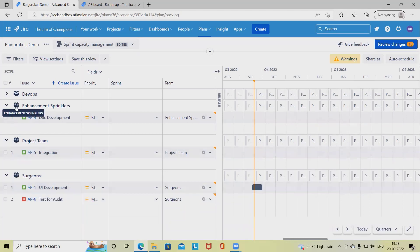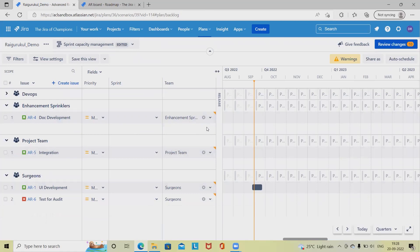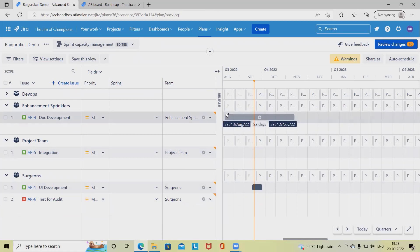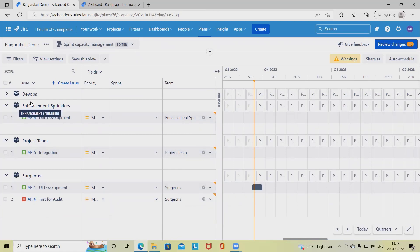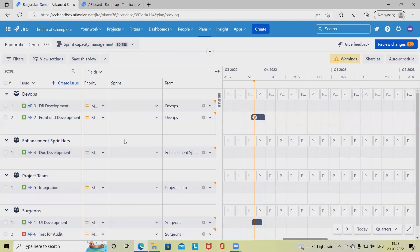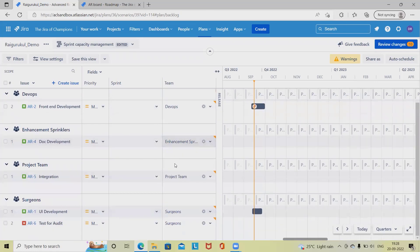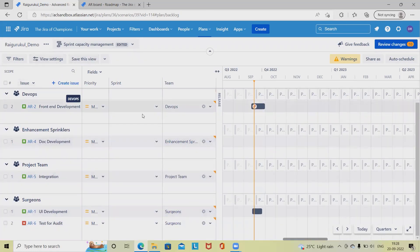You can see all the data which is available here. We can see the total capacity of the teams — each individual team's capacity — which we can modify accordingly. If we want to enable additional fields, we can do that as well.